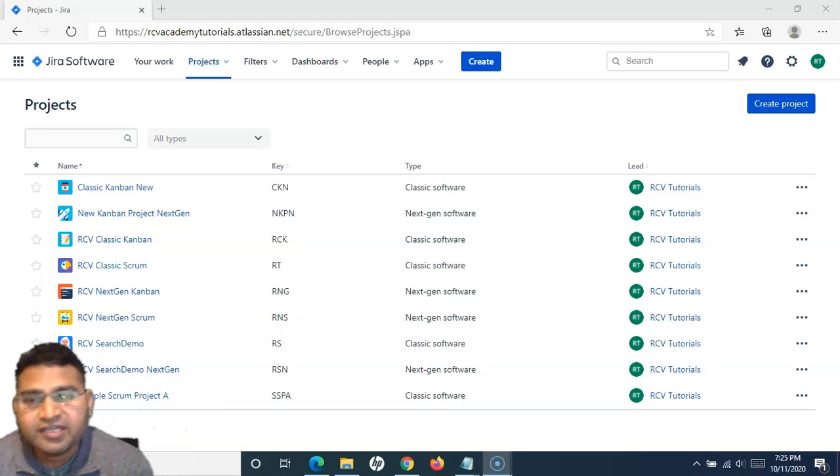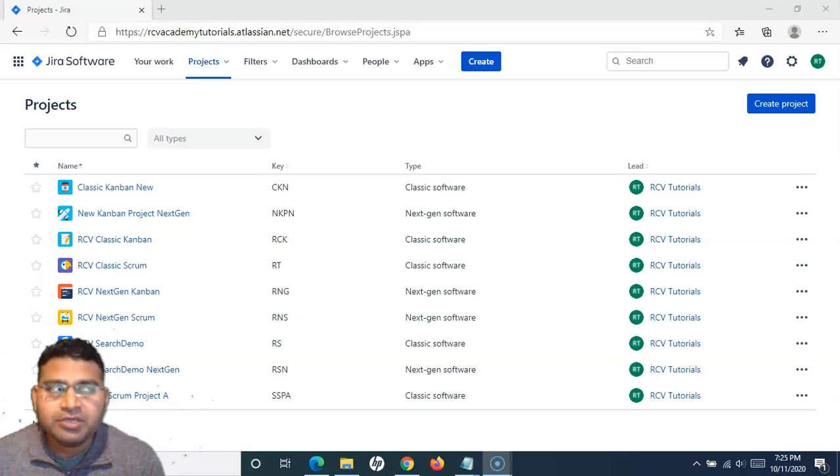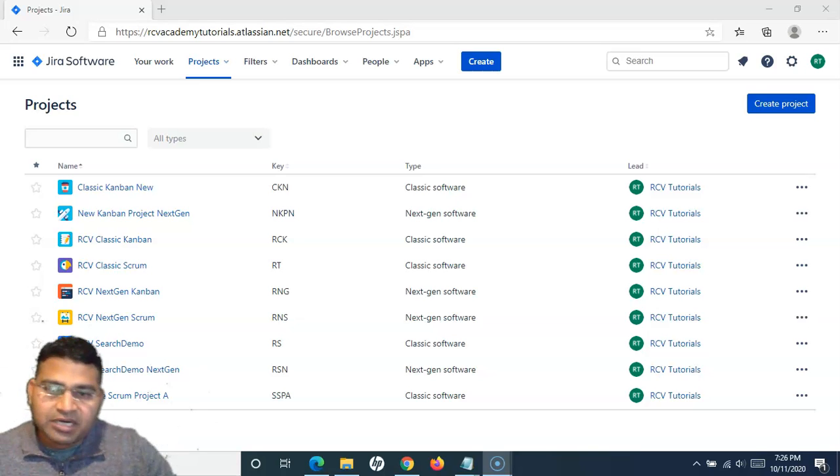Now before I get into the sprint report and reporting section, let me cover a little bit of detail about the sprint. In the Scrum development approach, we follow sprints or iterations, which is basically a 2 to 4 weeks timeline, in which you pick up work items, which are basically user stories or other tasks. For example, you can pick defects as well to be fixed. You work on those work items, and as a development team, you deliver working software by the end of the sprint. So there is a planning part involved in it, right?